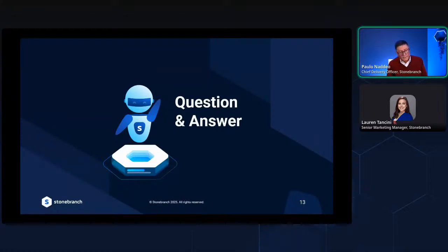So when you say downtime, right? Downtime should be almost nothing. We plan the transition and the downtime should be minimum. It's the time to deploy on that particular wave and then turn off the legacy platform. We converted workloads of 280,000 jobs in a timeline that was 14 months.